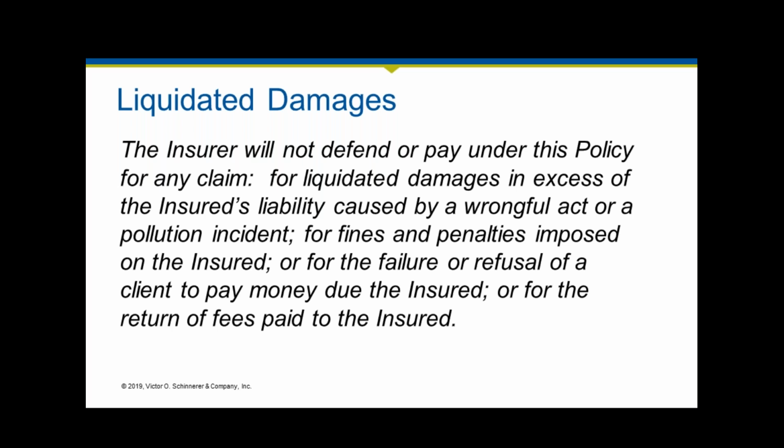An example might be if you're designing a dormitory and that dormitory has to be open by a certain date, or that college or university will have to put up all those people who would be in that dormitory in some private housing. Huge cost. So they may have the contractor have a huge liquidated damages provision in the contract. If that applies to you, that could be something that far exceeds what your normal damages would be because of your negligence in something that might delay the project. So you have to be extremely careful about those kind of provisions.